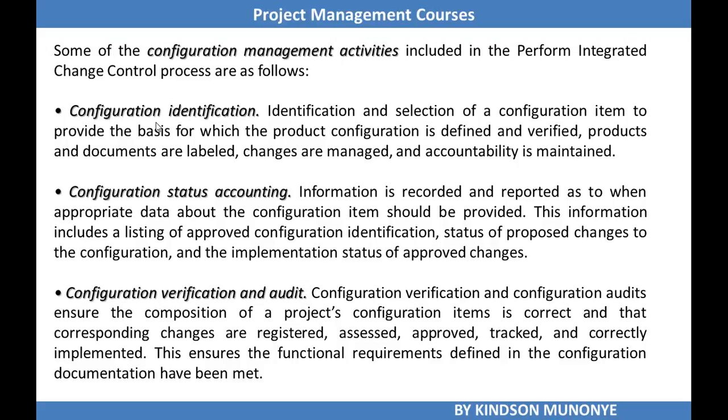I would like you to spend some time on the screen, maybe pause the video and take some time to understand how it works. Take note, configuration management activities include configuration identification, identifying a configuration item; configuration status accounting, recording and reporting configuration information; and configuration verification and audit. That has to do with ensuring that configuration items are correct and changes are well tracked.